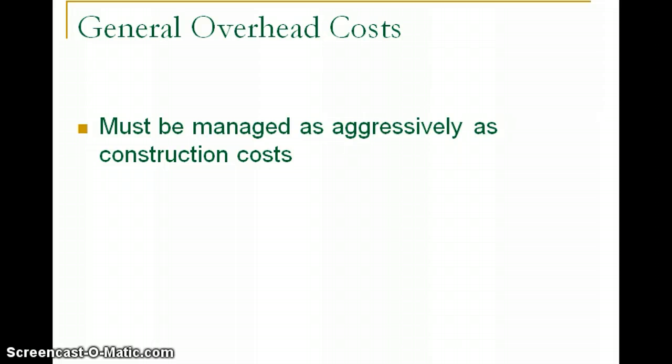The general or company overhead, well, that relates to the main office expenses. Under that overhead, we can have salaries of the cost estimator, the company owner, the staff that's needed to run the company. If the company rents office space, then the rent will be considered a general overhead expense. If utilities, insurance for the company, those expenses will be under the general overhead.